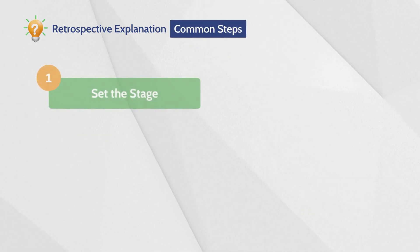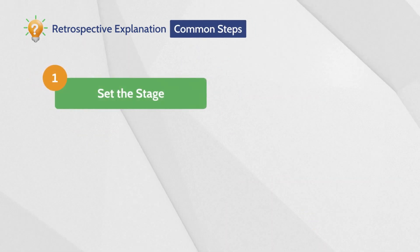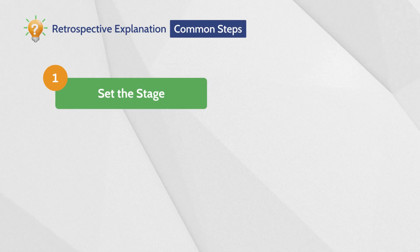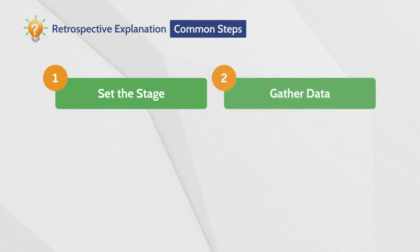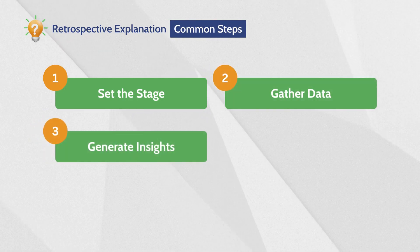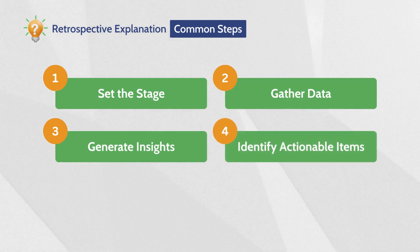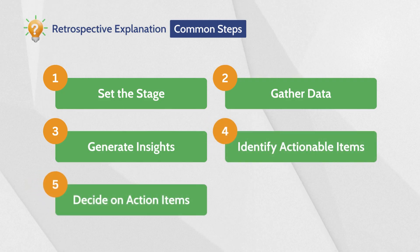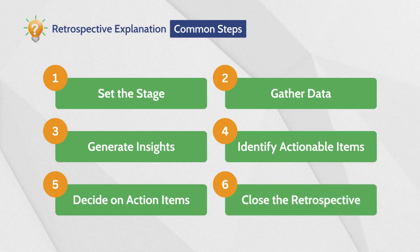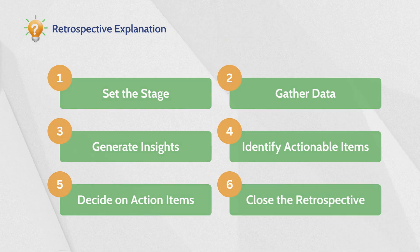There are some common steps that most Retrospectives follow: 1. Set the stage. 2. Gather data. 3. Generate insights. 4. Identify actionable items. 5. Decide on action items. 6. Close the Retrospective.